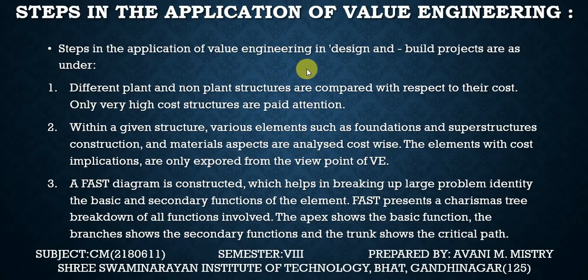Steps in the application of value engineering in design and build projects are as under. Different plant and non-plant structures are compared with respect to their cost. Only very high cost structures are paid attention.